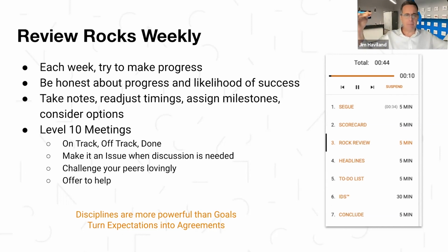Rocks should be things you talk about that day for sure, because they're the most important priorities for the quarter. We already established that. But just make sure you're spending that time, and we're still going to prioritize at the bottom and make sure you're talking about all the right things. But not when we ask for rock review. That's just for scraping out the opportunity to say, anything to report there? Yeah, I got a couple of things. Let's drop it to the bottom, because that could be a change in scope. Christine, we see this all the time, right? Hey, we got 50% into this and realized that what's really important is this, not this. I'm going to lop off this stuff, make it a phase 2 rock. I'm going to focus on getting this done and doing it well. Gosh, that's my favorite story ever when I hear that.